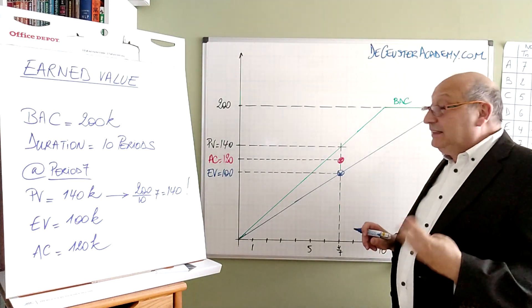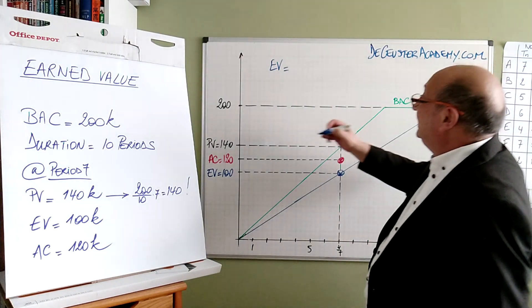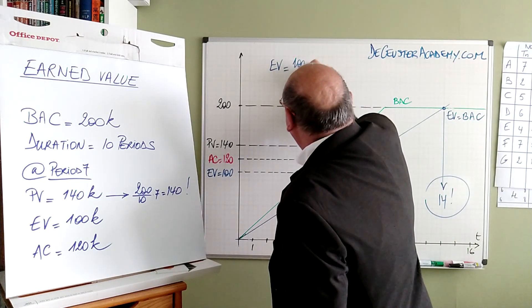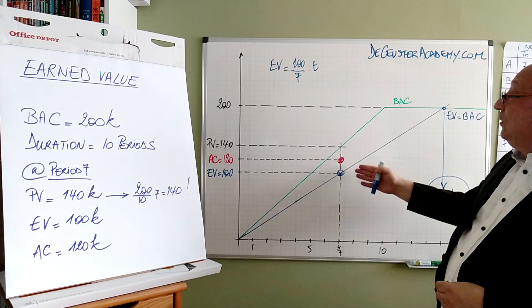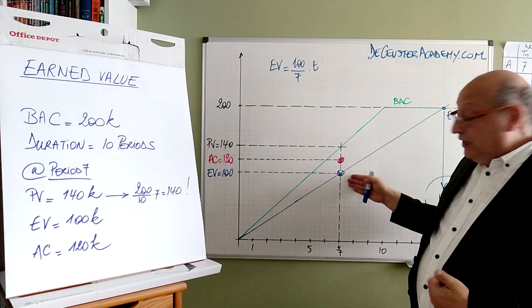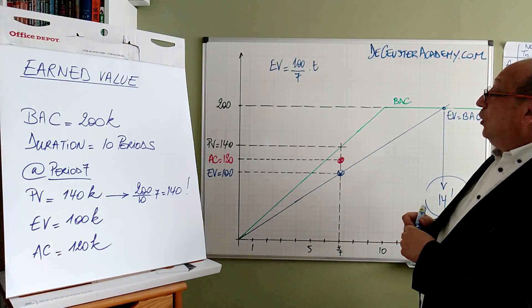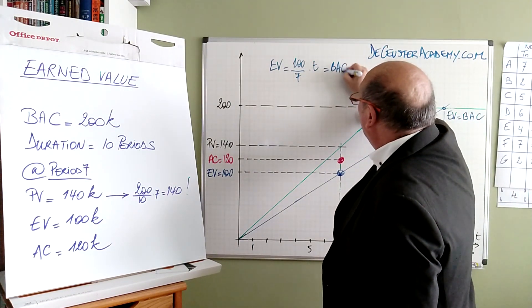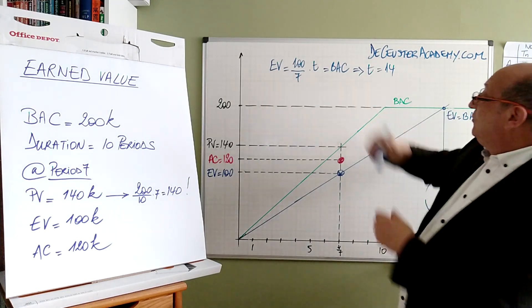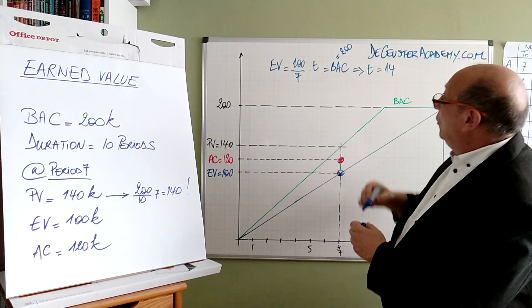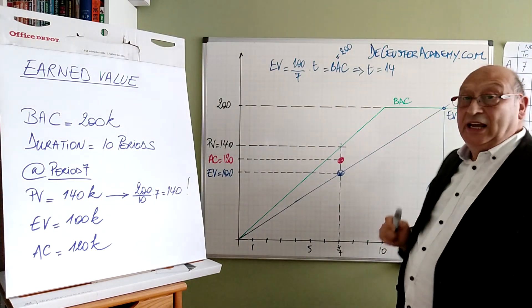But I can say that the relation of the EV with time, EV is 100 divided by 7 times the time. We want to know how many. So this is the relationship between earned value and the time multiplied with the time. So we want to say that this is equal to the BAC, so we find here that the time is 14. We have the BAC is 200, so we have T is equal to 200 times 7 divided by 100 is 14.